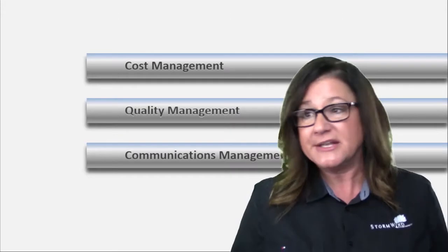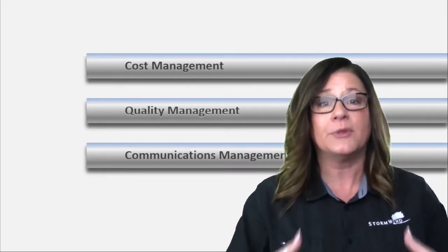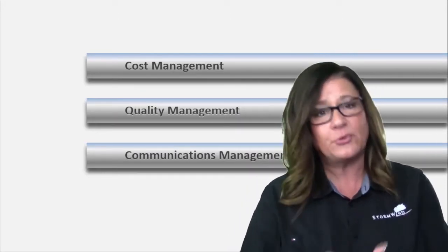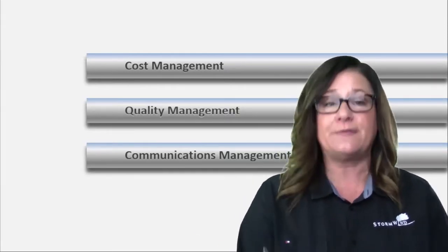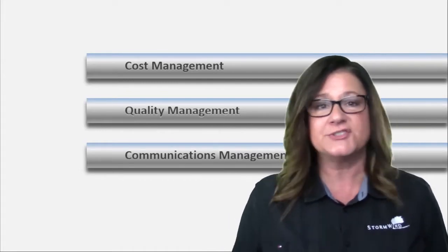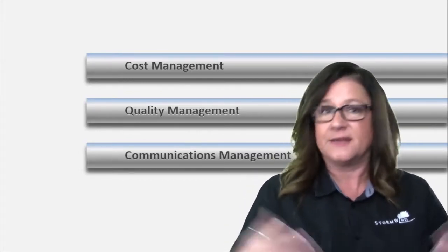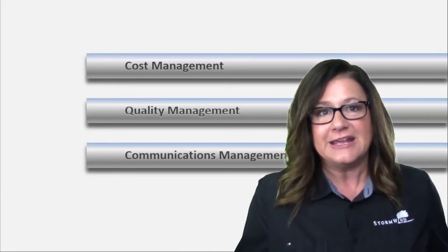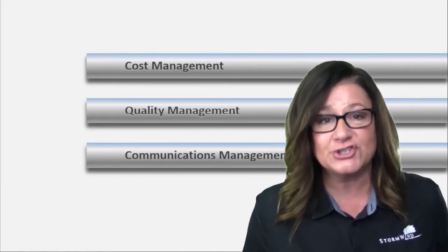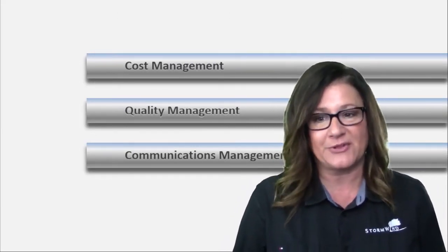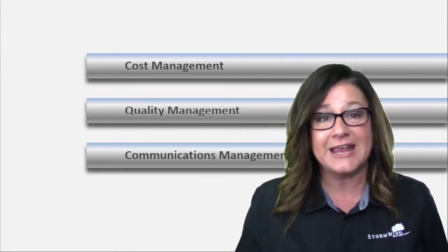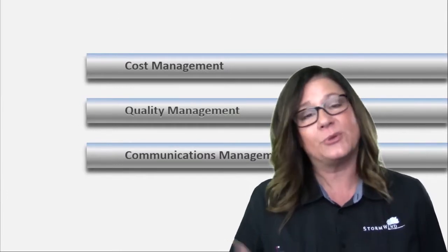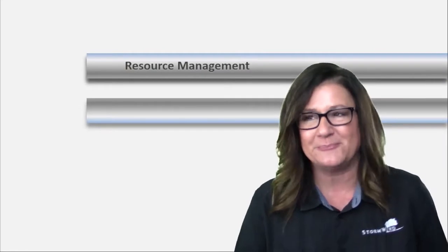Project managers spend approximately 90% of our time communicating on projects, so it's important for everybody to know how that goes. We also want to make sure that we're following that plan and we're not just changing when we do status meetings because we thought we could. In fact, you would have to go through formal change control to update your communications management plan. You can't just say, we're going to do it on Thursday now when everybody's been doing it on Friday, and not give anybody a heads up. So communications management planning, definitely an important aspect of project management.